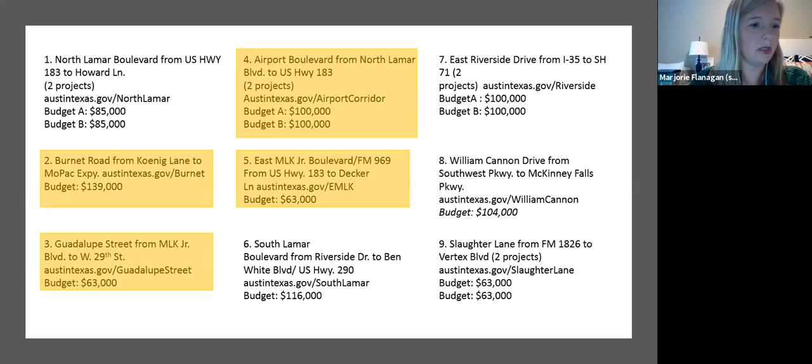Each project budget is inclusive of design, fabrication, installation of the artwork, including shipping, insurance, travel, and all project-related costs. The funds for these 13 public art projects are derived from the 2% of each estimated corridor construction improvement project budget as directed by the city's Art and Public Places Ordinance. The combined artist budgets for all 13 opportunities is $1.18 million. Today, we're going to be going into detail for 5 of the projects.